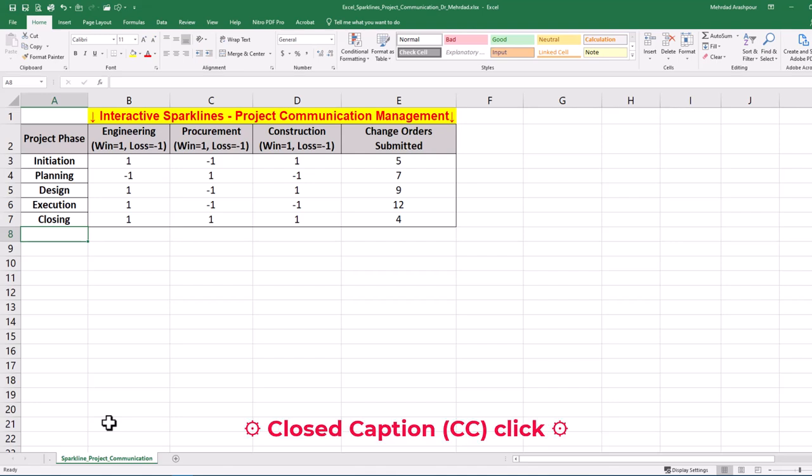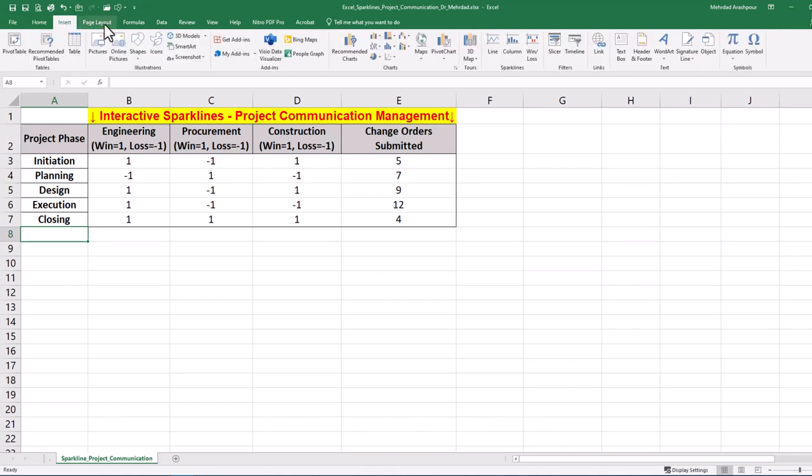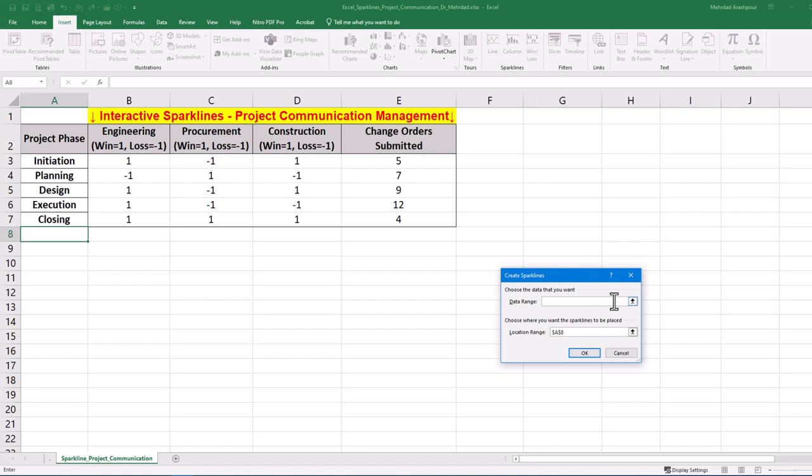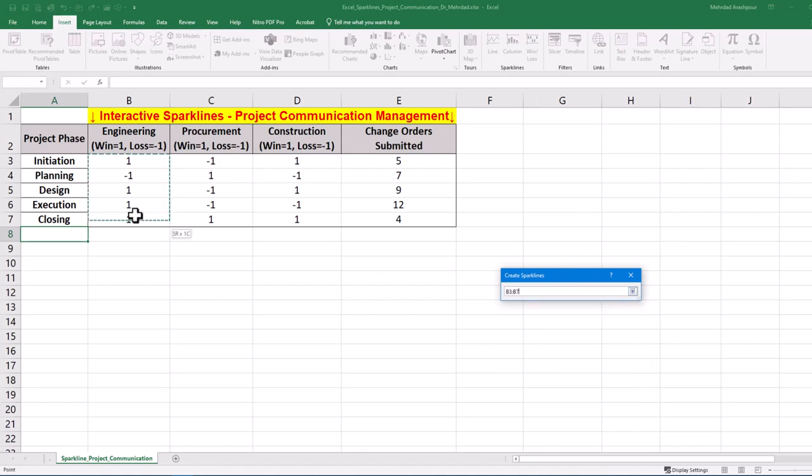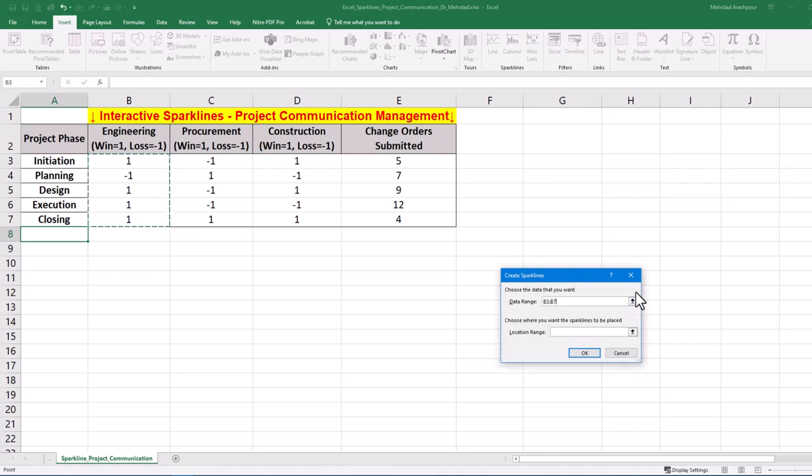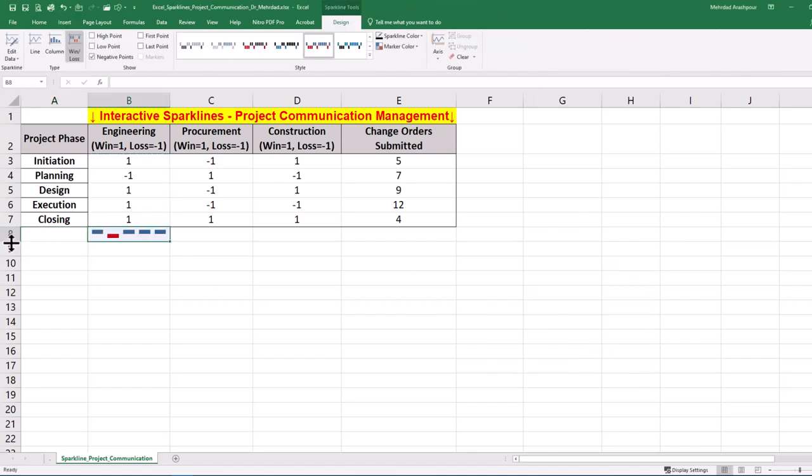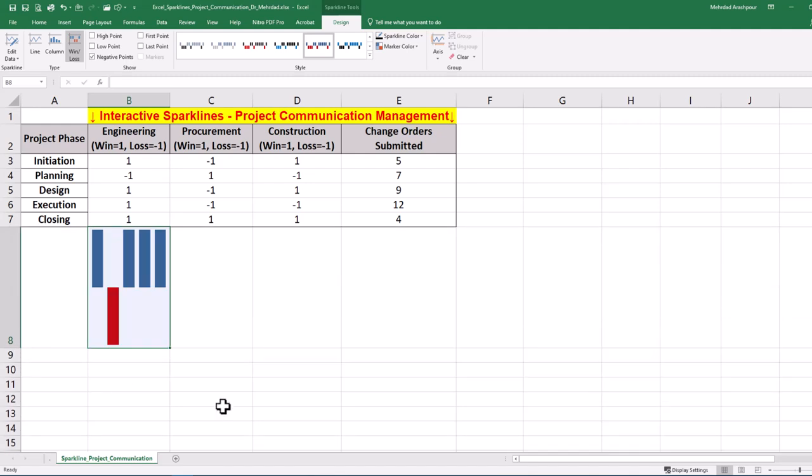We can use Excel mini charts to find patterns in project communication management. Go to the Insert tab and click on win-loss sparklines. Then select the data range and specify the location of our chart. We may adjust the cell height for better visualization. Then drag and duplicate for procurement and construction phases.